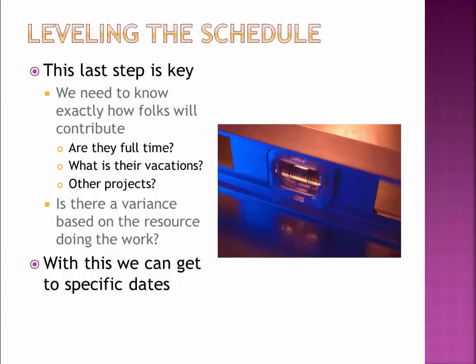We want to take the details we put out there and put them into probably a tool. Microsoft Project is a very standard tool for this. You would take that tool and say, I have this list of tasks, and they're going to look much like the work breakdown structures. This task, this is how long it's going to take. But then that's where who's working on it comes in. We assign it to a person. Now we can assign it to a role to start with.